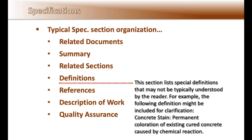The definitions section lists special definitions that may not be typically understood by the reader. For example, the following definition might be included for clarification: 'Concrete stain — permanent coloration of existing cured concrete caused by chemical reaction.' Or, for concrete floors, the definition of the FF and FL numbering system, referring to floor flatness and levelness.